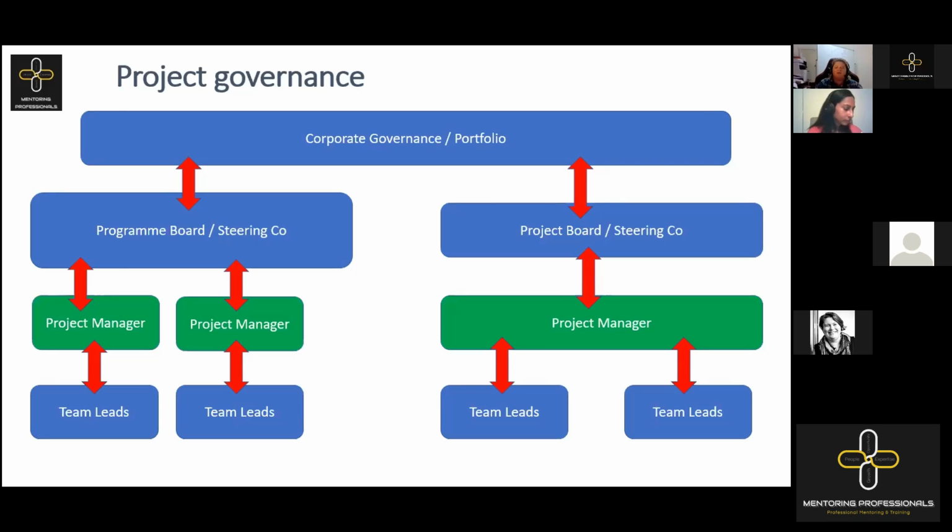So you're not wrong, risk and issue management, so having those registers themselves, certainly project controls. The number of management stages, when I say management stages, that is very much a PRINCE2 term. Increments, if you're coming from that agile environment. Stage gates, if you are in a gated way of working. They are all project controls. It enables the board to actually maintain that authority and that control over the project and delegate that authority for the management on a day-to-day basis to the project manager.